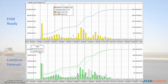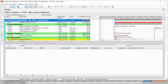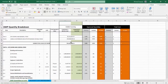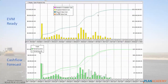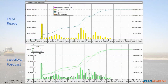Here's the result: earned value ready, cashflow forecast. What we have on the top of the screen is basically plan value — our plan value curve up to $35 million. Our P6 project total is 36,161,868, and if I head over to my spreadsheet, it's 36,161,688 — so we got it to match almost down to the penny, with just a couple pennies difference. We have our plan value curve, so we're ready to do earned value management. For cashflow forecast, we are ready — this is our banana curve, our early curve and our late curve. It's a great tool to forecast when your outlays or income are coming in, and that's why you want to look at the early and the late curves.